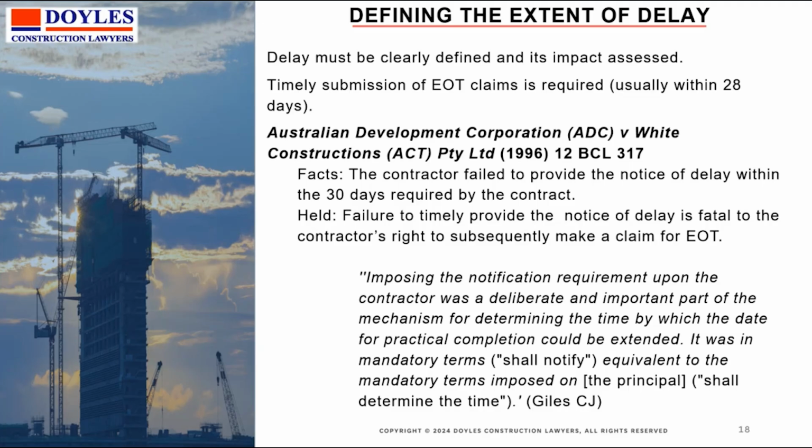Defining the extent of the delay, the situation is again coming back to this aspect that if you don't notify and if you don't explain in your notification the substance of the delay and its relationship with the critical path and its duration, then you may not get much sympathy. In Australian Development Corporation and White Constructions, a contractor failed to provide the notice of delay within the 30 days. It was considered fatal to the right to subsequently make a claim for the EOT.